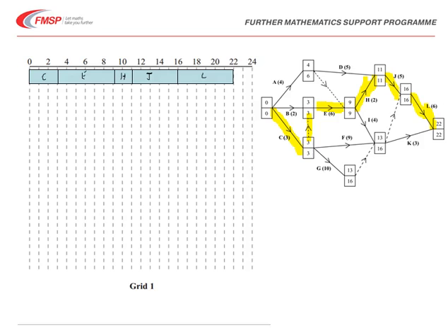We then add in those that are left, for example A here, with its duration of 4 and its earliest start time, which in this case is 0, coupled with the latest time, which is 6. So A starts off at 0 and we indicate it with a duration of 4, so a block of length 4. You could actually write in the values A4, but then just a little indication that in fact it could go up to time 6. So rectangles of the correct length, and then showing what's called the float time after that.